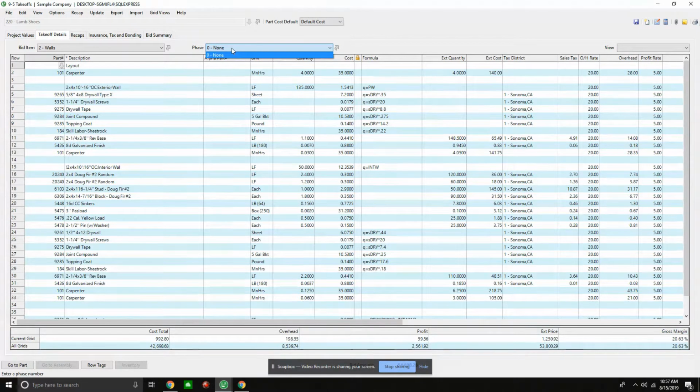Because I might find out in building A that we went over a little on cost, so then I can make the necessary adjustments on building B. So it really allows me to not only track my costs in many jobs inside of a larger job, but at the same time, when I bill out, I can bill out in phases too. So back to my three building example, we might have laid the foundation on 1, 2, and 3. And then we started building a little bit on building B, and did a little construction on building C. We can bill those out in different phases.